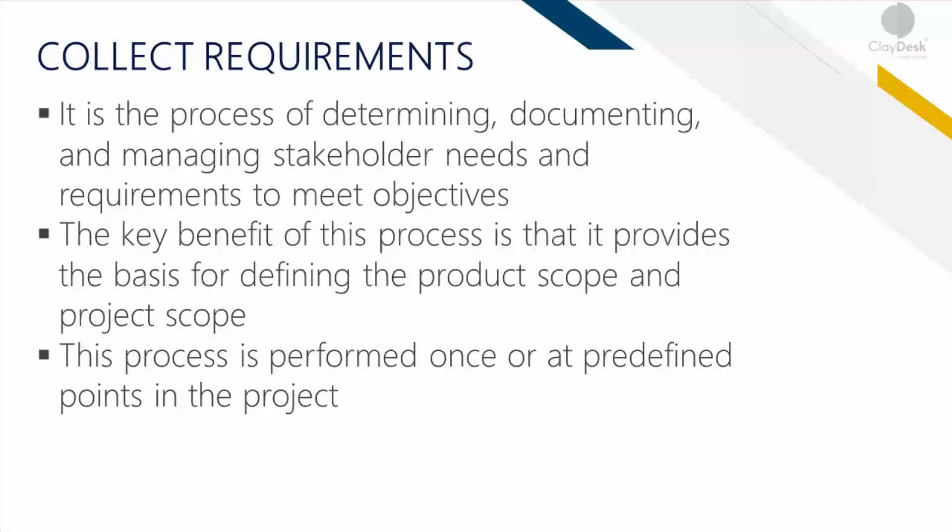In collect requirements, the inputs are the project charter, project management plan, project documents, assumption logs, business documents, and so forth. The tools you can use include expert judgment, gathering additional data, performing data analysis, and making decisions. And of course, the output is the requirements documentation or the requirements traceability matrix.